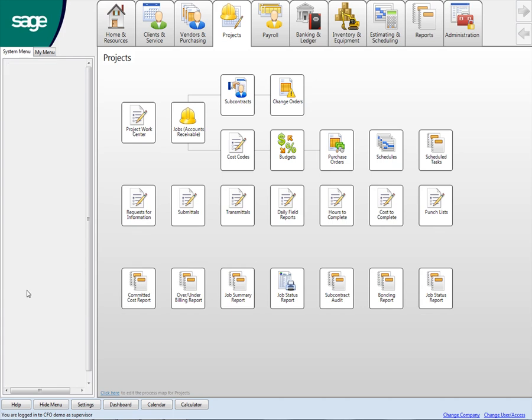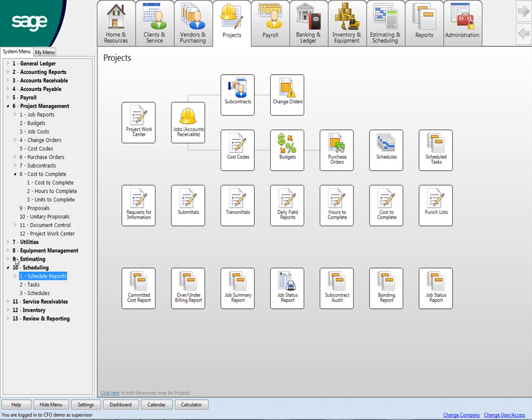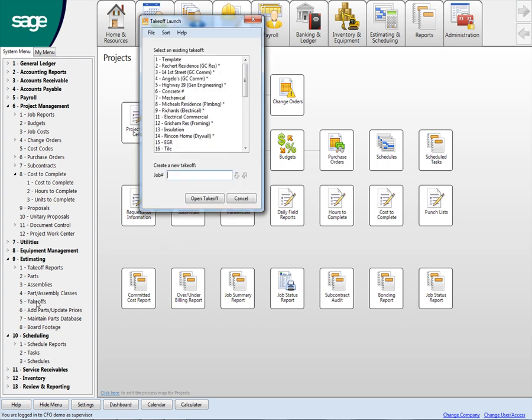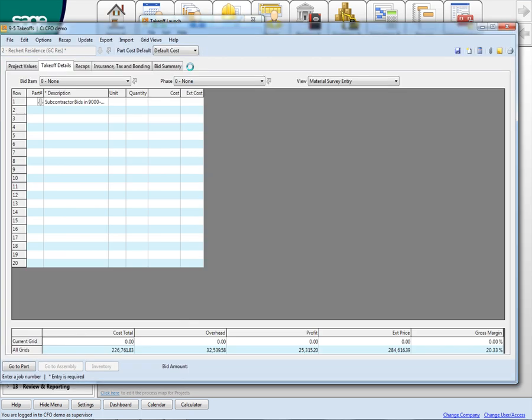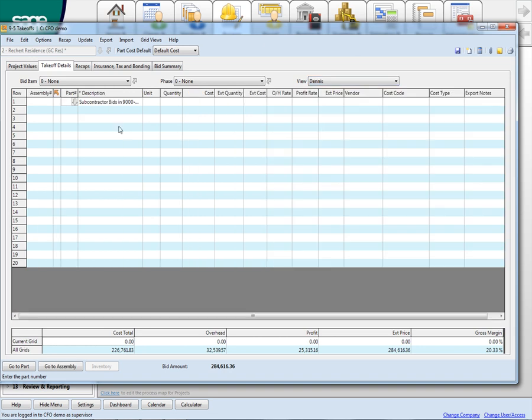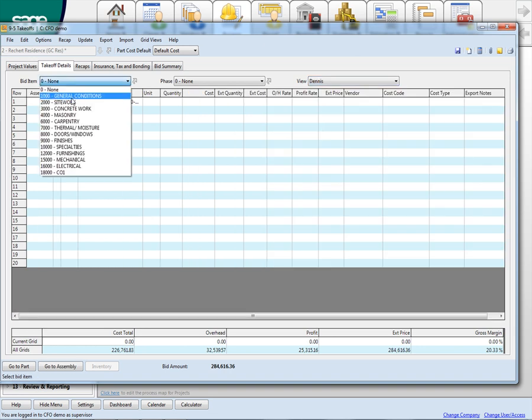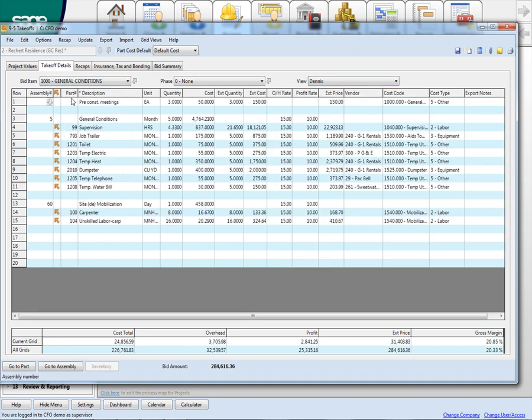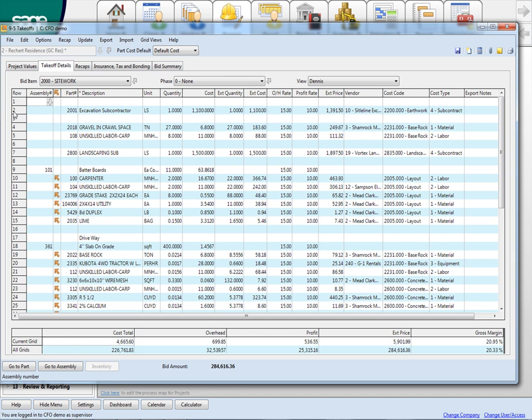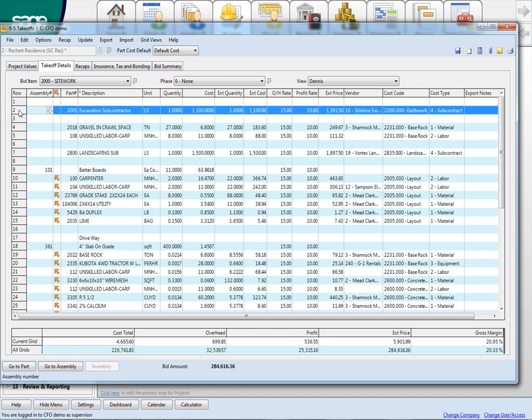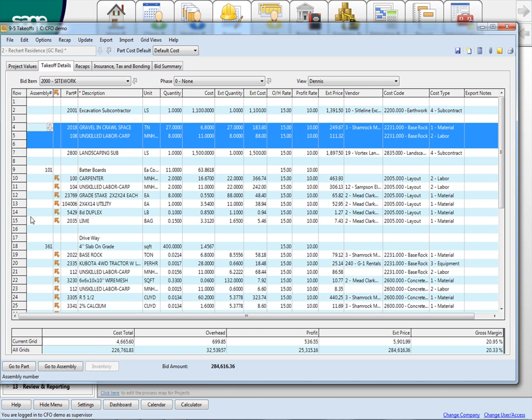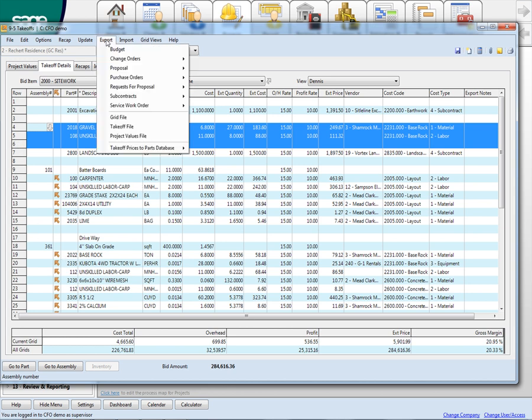Real quick look at estimating. It's something you can absolutely add later. So here's my general conditions. There's all the things I need for general conditions. These are templates that I've got built. For site work, I'm using an excavation sub, so I've taken his price. I'm actually going to do some of these items myself, so I've got detail. And once I'm done with that, I can now move all my costs out to the budget.